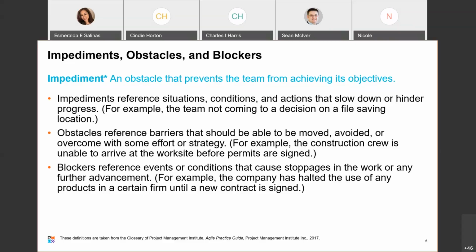The number and weight of impediments may vary throughout a project, and this variation may even fluctuate throughout the day. The team identifies the impediments and brings them to the attention of others on the team. The project manager assists in facilitating the evaluation of the impediments and how they could or could not impact the team's ability to deliver the desired value. Based on those judgments, the team figures out how to address the impediments. Often the resolution, or occasionally the research, is performed by the project manager to enable the team to focus on more meaningful, productive tasks.